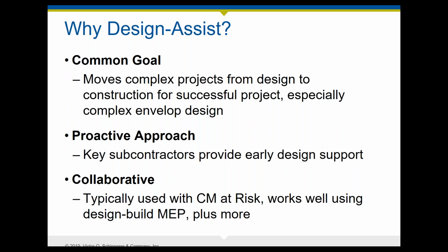In one of the first ones, there were separate contracts between the architect and the owner, and a contractor and an owner, but they were entered into about the same time. So that was early contractor involvement. The contractor would be on board, usually on a negotiated basis, early on. And the contractor and the design team would share a set of general conditions, with the idea that there would be constant interaction between the two. And that is really good on complex projects because it really helps to produce a successful project delivery.